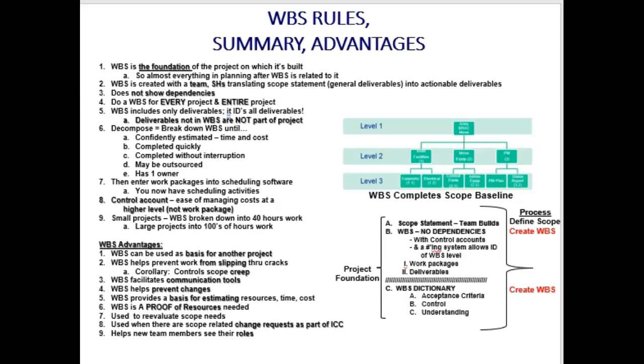I need more details. Who's running the package? What are the safety standards? What is the due date? What are their constraints and assumptions, et cetera, et cetera. Those details are going to be in the work breakdown structure dictionary, okay?